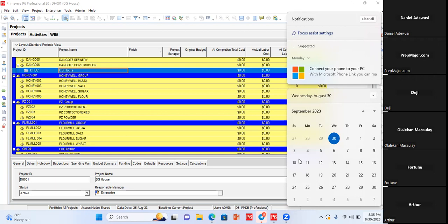And what is the next question after that? Who can tell me? I mentioned it earlier on. How many hours per day? Thank you. What is your capacity per day? What is your resource capacity per day? Some will say our FTE. FTE stands for full-time employee. Our FTE works 40 hours per week. That means 8 hours a day.